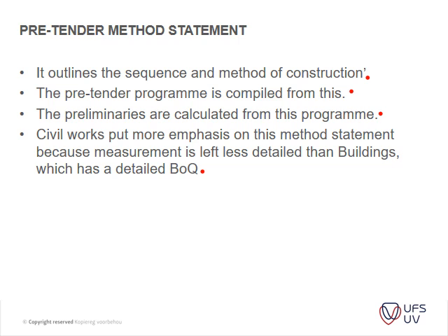So whenever you're doing pricing, I've seen items in an engineering contract bill of quantities where they measured a building as one item. Build this size building, this high, with this type of roof, and there you go. You have to measure the whole thing and build it. So you have to compile a whole method statement and actually measure it. A lot of work is done by the contractor to actually get to a rate. It's almost like a design and build type of thing that you need to submit.